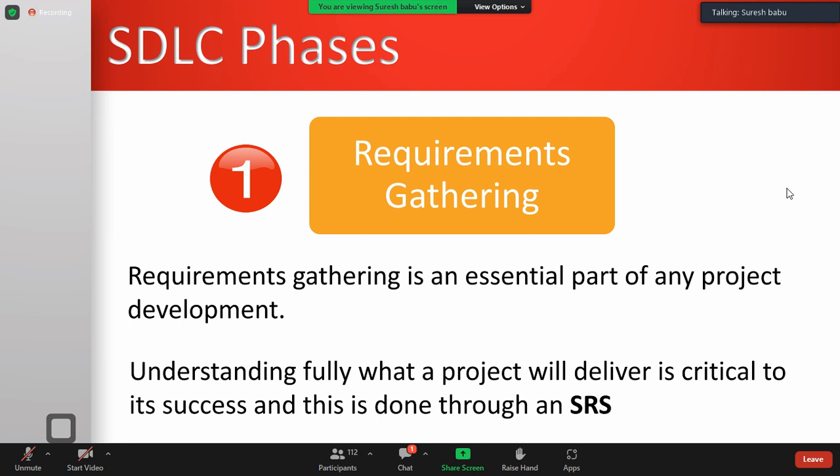After gathering and documenting the requirements, our people again go back to the client, explain the requirements, and get the confirmation. This is called requirement reviews. Requirements are tested and confirmed by the customer. Once the requirements are verified, confirmed, and approved, the approved requirement documents will be delivered to the next level, the design level. Finally, the first activity involved in building any software application is requirements gathering.